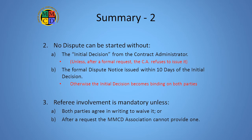2. No dispute can be started without A. The initial decision from the contract administrator, unless after a formal request the CA refuses to issue it. And B. The formal dispute notice issued within 10 days of the initial decision. Otherwise, the initial decision becomes binding on both parties and unappealable.